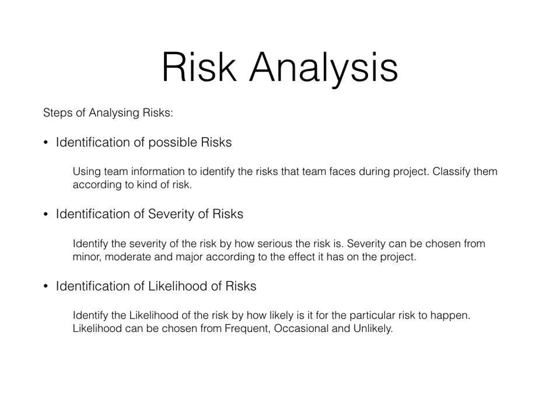Risk analysis, how to analyze a risk. There are a few steps of analyzing a risk. First is to identify the risk. You can use team discussions with development teams and requirements teams. You can meet up and discuss with them what kind of risk they think will arise during project development.